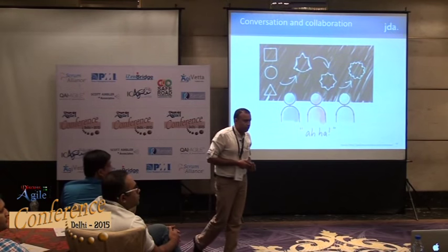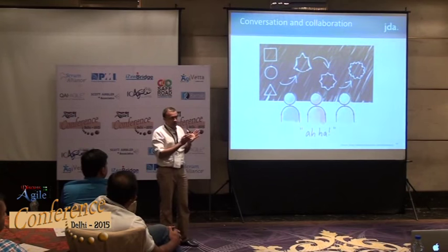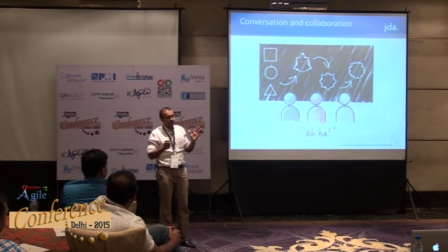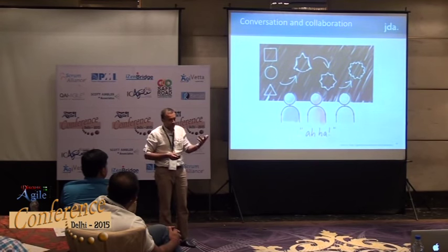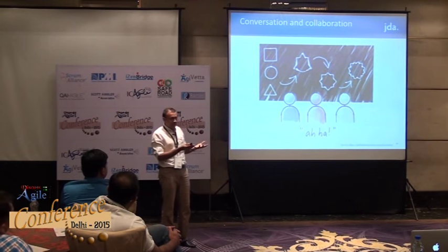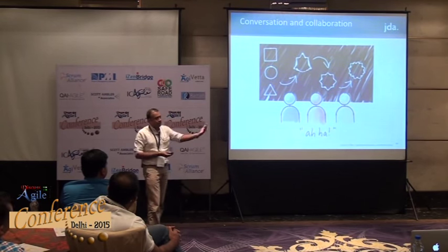No, it's not about everybody from day one. It's going to be ineffective if you start with everybody involved on day one. Whoever is involved, you pick and choose. The product owner will have a better idea about who can give more ideas. When it's shaping up, or when it's almost in shape and these guys have contributed, probably you can involve the team.